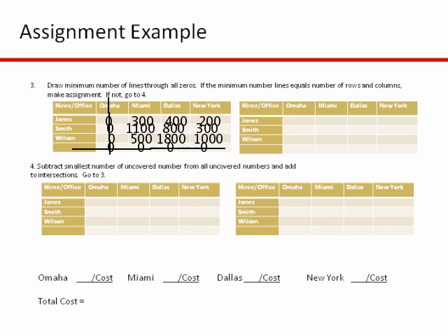All right, so if you look at all the uncovered numbers, here they are. Okay, and so it looks like the smallest uncovered number is 200. So what we're going to do is subtract 200 from all of those uncovered numbers. All right, and by the way, you leave the lined values the same except if they're at the intersection. If they're at the intersection, then in that case, you're going to add what you subtract. So the first row is going to be equal to this.